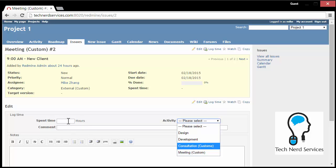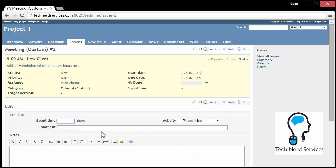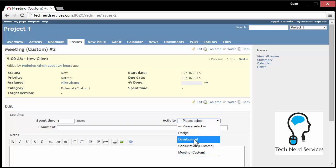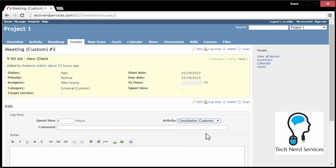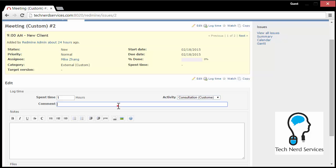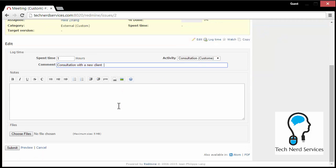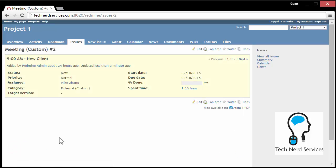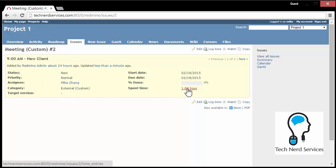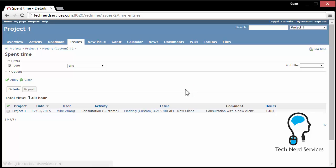And then there is spent time, and if I want to put comments. So if I said I want to put one hour, and in this one hour I was doing a consultation. Then I can say that this was a consultation with a new client. We'll keep things pretty simple. From there, I will go ahead, I don't need to put any additional notes, and I'll go ahead and hit submit. So now we see that this one hour has elapsed, and that's basically the only change that I've made. If I click on this one hour, I can see also the activity that I did, any comments that I did, and it will track this for me in the total time. And then there is a reporting feature as well.